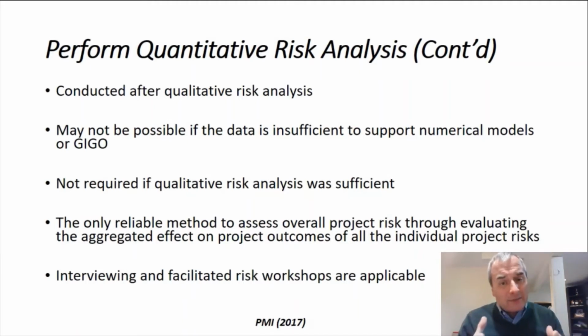It may not be possible if you don't have sufficient data to support the numeric models, or you have garbage in, garbage out. And it certainly is not required if qualitative risk analysis was sufficient. Do not, I repeat, do not think you must always do quantitative risk analysis, because it does require the time investment, the expertise, and in many cases, the prioritization that results from the qualitative risk analysis is definitely satisfactory. You don't always have to go and do quantitative risk analysis like I just mentioned.